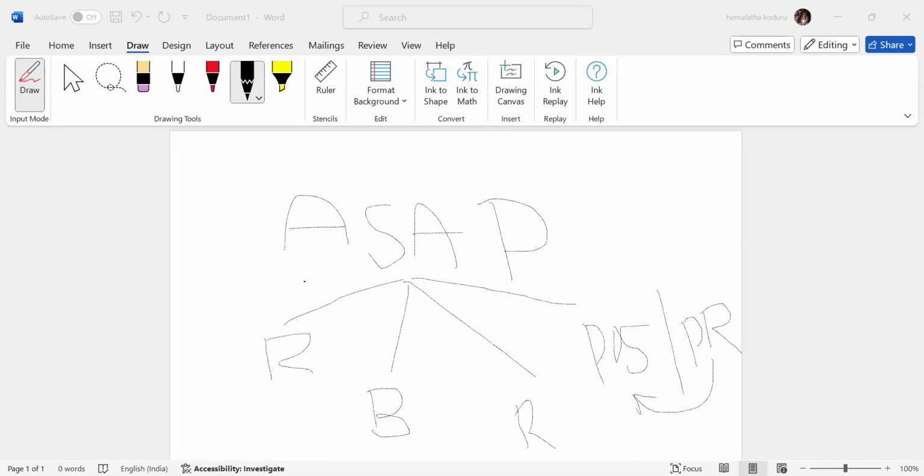After requirement gathering, you prepare one high level design document covering what they are currently running and what we are going to implement in SAP. In the requirement gathering stage, you are just listening and writing down notes. Some clients give the workshops orally, and some share PPTs and documentation also. They give some information precisely because they might be expecting more. So after the requirement gathering phase, you move into the blueprint.